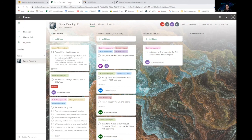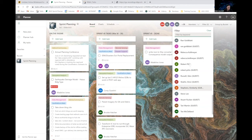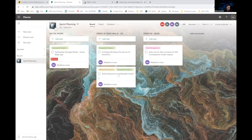Our team really uses it daily. When we are given a task by the customer, it gets translated into a card pretty near immediately. Anything we're working on or updating in a standup should be represented on our task management board. During our standups, we will actually screen share this board and filter by the person giving the update. If I'm speaking to a task that's not shown on the board, I would then need to go and make a task to make sure all the work we're completing is being tracked in the system.